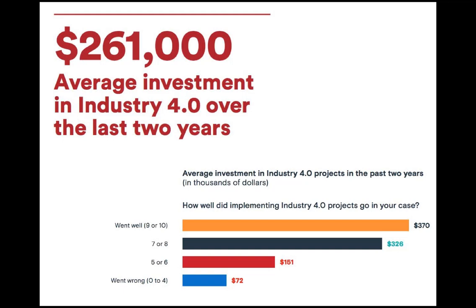And really for any of these dollar amounts that we're talking about, as long as you have a path to get that return on investment, which comes back to having those immediate short-term and long-term goals for the project, and you make your investment in stages, you can really reduce the risk of these projects. You can also make sure that you're holding your vendors accountable, making sure that your employees are understanding whether the project's on track or not, and then allowing everybody to share in the success when it is successful.